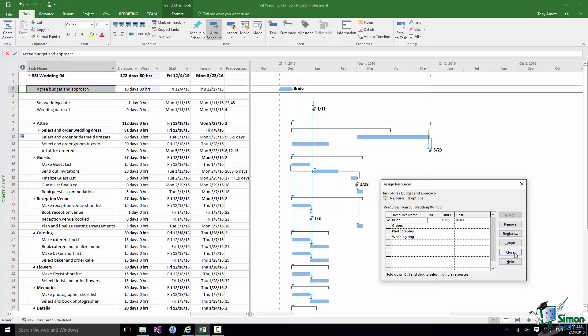Now one very important point I'd like you to bear in mind here, and this is going to become increasingly important later in the course, is that the 100% means that the Bride is working on this task full time. In reality it may well be that she is not working full time and she's actually doing her day job most of the time. But for the purposes of this particular project all I'm going to do is treat that 100% as being all of the time that she has available.